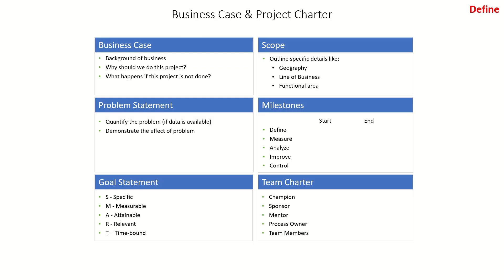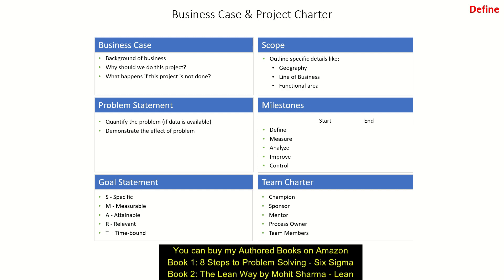We will learn DMAIC methodology here as well. The first phase is Define. In the Define phase, the team has to create a business case and a project charter. There are six elements of a project charter: business case, problem statement, goal statement, scope of the project, milestones, and team charter. The first thing the team has to do is create a project charter. In the business case, we put down the business background, why we want to do this project, and what happens if we don't — the losses being incurred should be mentioned in the business case.